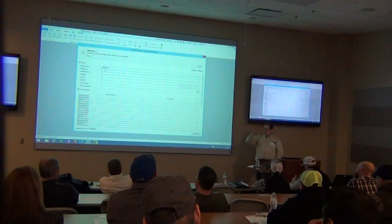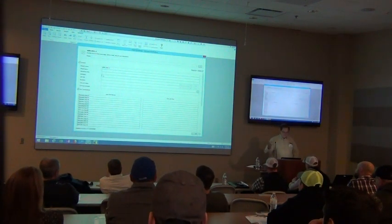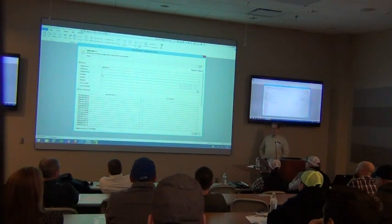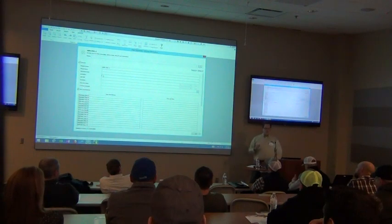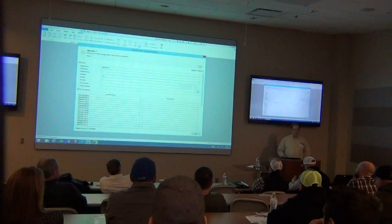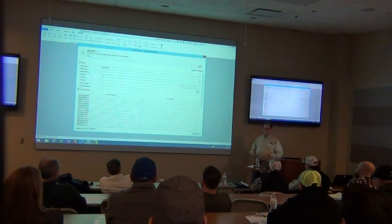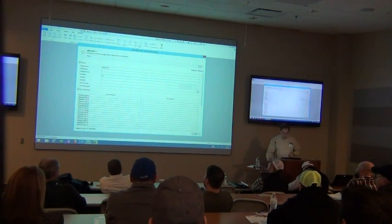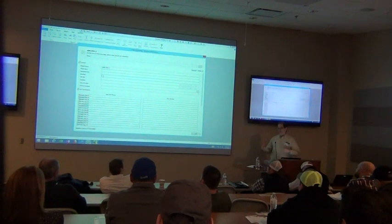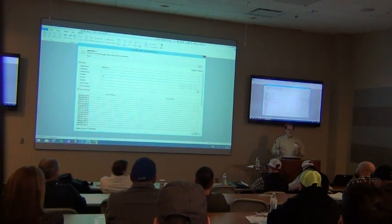If it's a large enough company with multiple estimators, put the estimator's name in so you can tell who did what. Sometimes multiple estimators work on the same job. As a company, you can also track what types of projects you have a better success rate on — your close ratio. Some people say they get awarded four out of ten jobs. But where? Are we doing better in schools or healthcare?